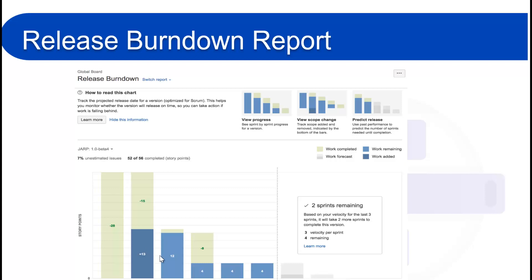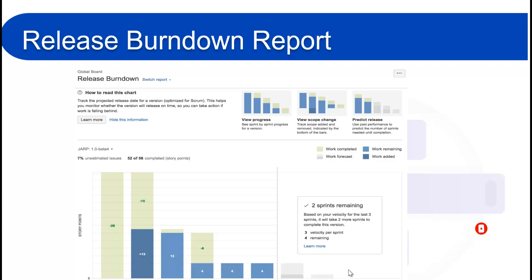The gray areas or gray bars at the end of the chart are the predicted number of sprints it will take to complete the version, based on previous sprint performance or the changes in your sprint.